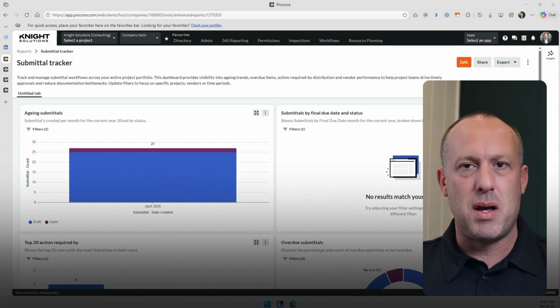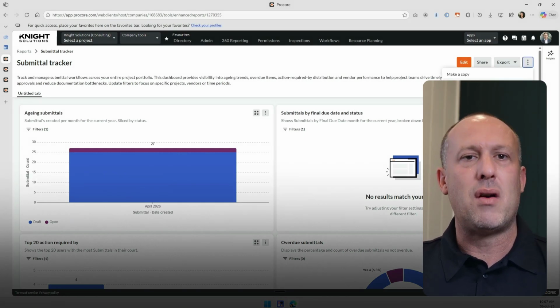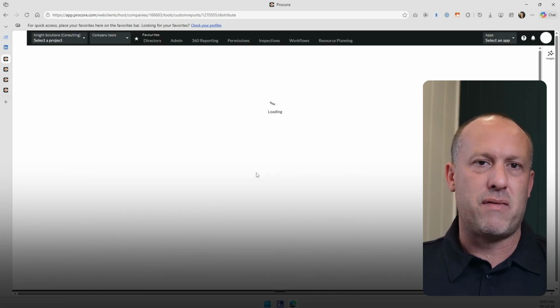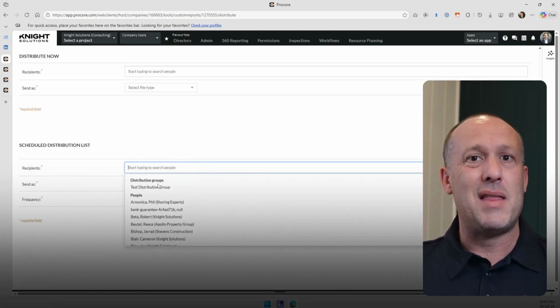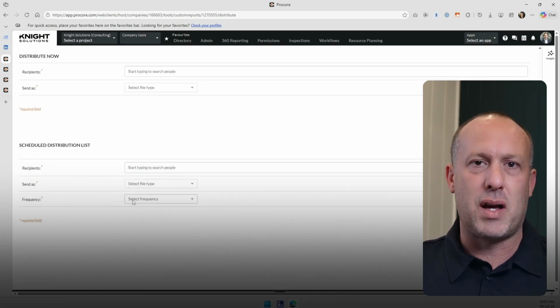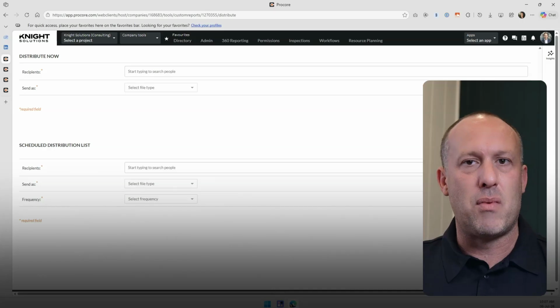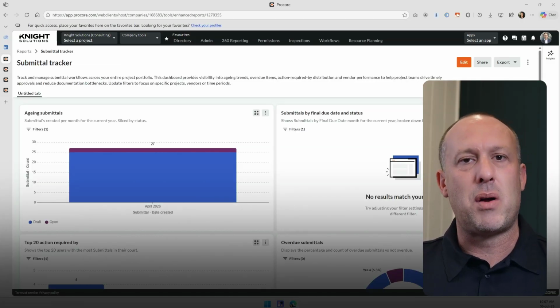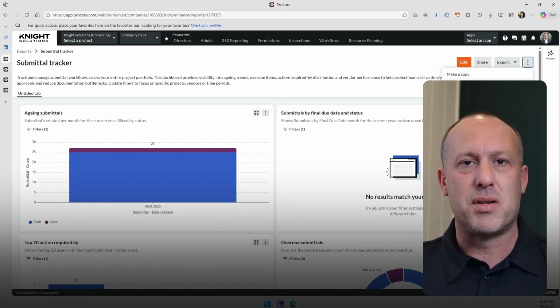And a small tip here, you can set up reports and automate them to go out to external parties via email on a regular basis, and then turn off pesky overdue notifications and use these automated reports instead. It's a much better way to collaborate, especially with external stakeholders. Now, the reporting tool is powerful and project admins aren't using it enough at the project level. And make sure you give any feedback to your company administrator on reports that you'd like to see pushed automatically when new projects are created from the template.